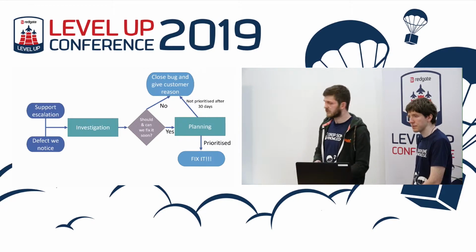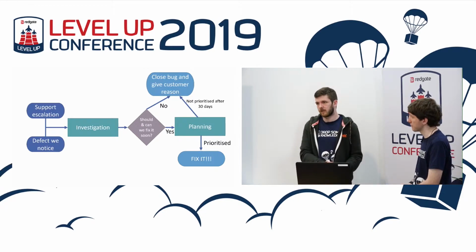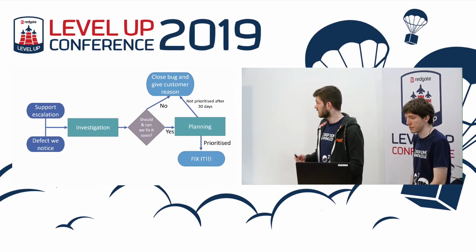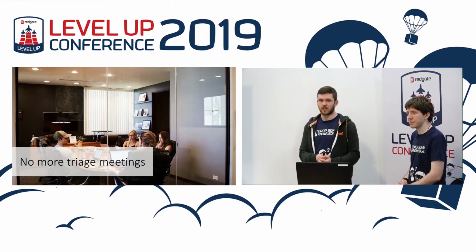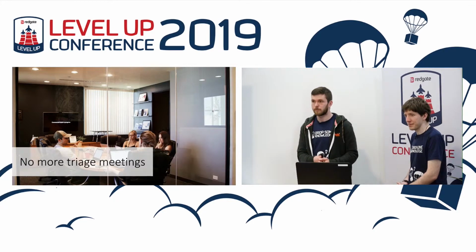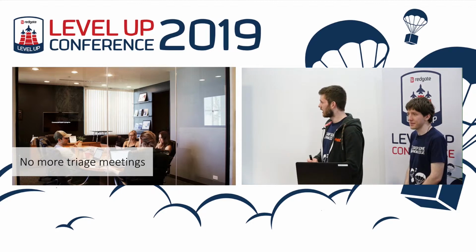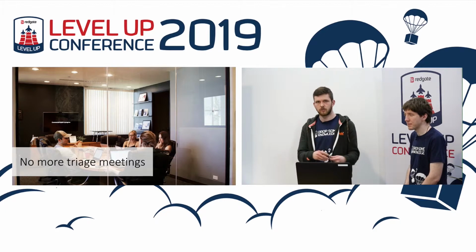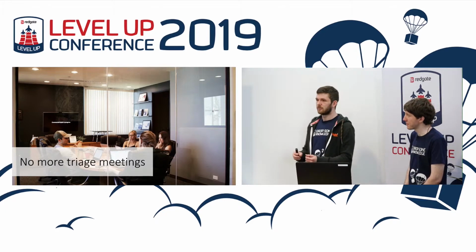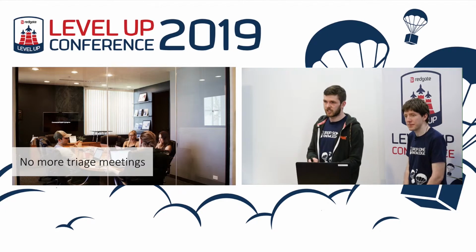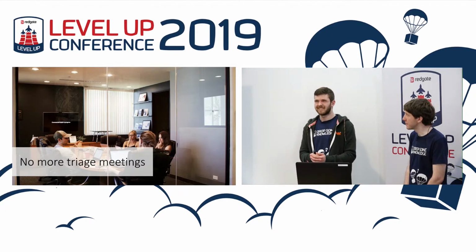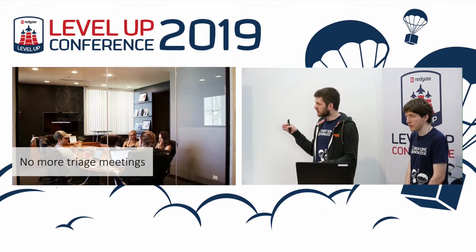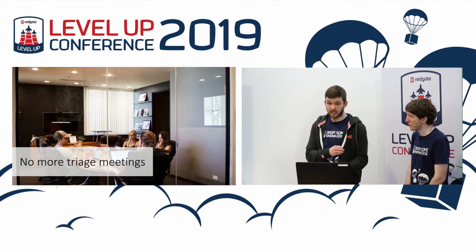So we've noticed a bunch of really big advantages of working with a zero bug policy, both for development teams and for customers. The first of those is no more triage meetings. Yep, no more triage meetings. I'm sure many of you have suffered through a meeting in a stuffy room, probably Jellyfish or somewhere like that, where you spend an hour and a half staring at a Jira backlog of 50 bugs going, are we ever really going to get to that? You don't really have that problem anymore. You just deal with each bug as it comes in and deal with it right away.